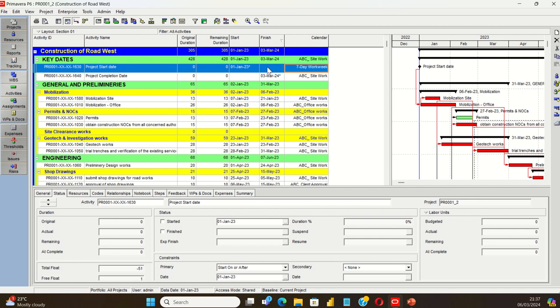So you have to go all the way from top to bottom through the critical path and try to reduce some of the relations, change some links, and change some of the lags if you have, and then bring it back to 1st of January 24 with these calendar assignments, and that will fit your schedule to the project requirement. I hope you understand the effect of calendars, and in the next video I'm going to show you the effect of resource calendars as well.